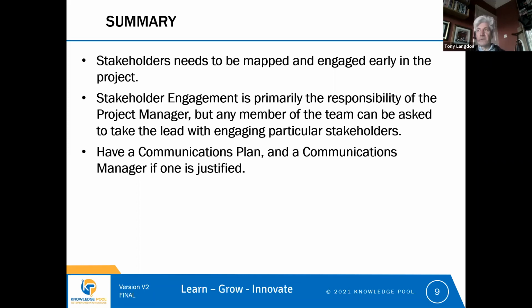One of the ways they can stop a project being successful is by holding back information. So if there's information that the project needs in order to move forwards, sometimes stakeholders can hold that information back, knowing that the project can't move until they release their information. So this is one technique that I've seen, and there are other things that stakeholders can do. In very bad situations, they can provide the wrong information to projects, knowing that it's going to delay the project.